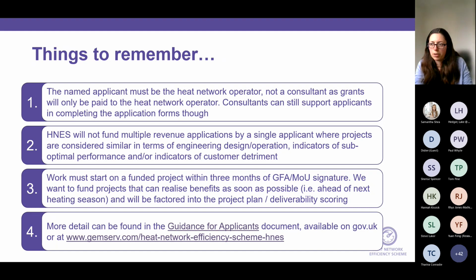Number 3, the work must start on a funded project within 3 months of signing the grant funding agreement or the memorandum of understanding. The main reason for this is that we want to realise the benefits of the funding as soon as possible. Within the requirements of HNES from a DESNZ perspective, there are a number of benefits they want to realise in relation to reduction in heat generated or reduction in consumer bills, all that kind of thing.